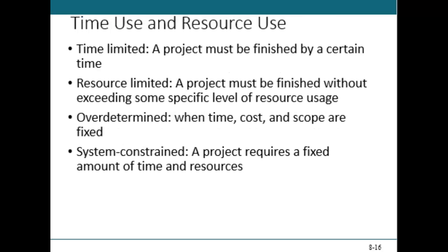Now, so time constraints, just to touch on that some more, can be adjusted, as we've seen in the compression techniques above, but of course at a cost, right? Often, however, the resources that may be added to the crashing technique have diminishing returns. So I can't just keep adding personnel and cutting time, of course, right? That law of diminishing returns. So all knowledge areas, frankly, I also want to say are constraints on the project. A constraint by its very definition limits your options, right?